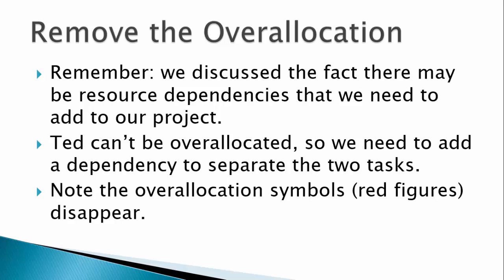There are other ways we can resolve overallocated resources, but they are beyond the scope of this segment. We did solve an immediate issue, and since the tasks are not on the critical path, we didn't impact the overall project duration positively or negatively.